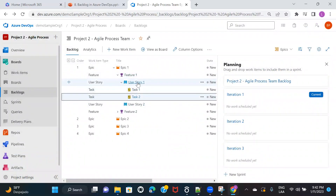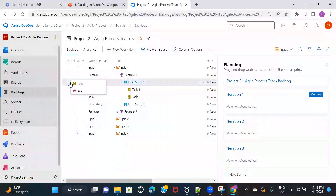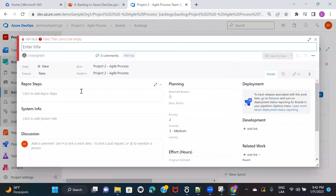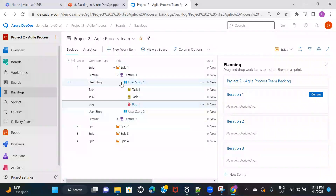Let's say your user story is completed and the QA/testing team has started testing. If they find a bug or defect in the user story, they can come here and create a bug on this user story — which is nothing but a defect. So Bug 1, save and close. We'll discuss the details of every work item later, so don't worry about that now.